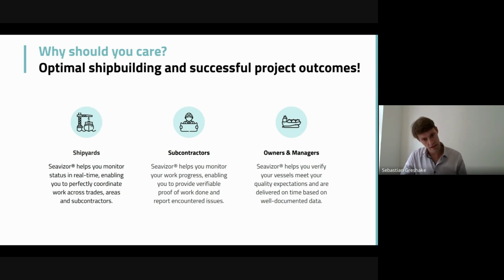And also you might have the situation as a subcontractor that you want to work, but you might be blocked by other circumstances. Maybe some other trade hasn't finished work in time, or you might face the issue of missing materials, whatever it is. You then get the means here to log those things properly to make sure that you're not the company in the end that pays for others' faults, basically.